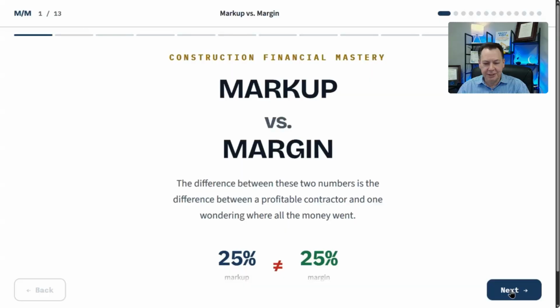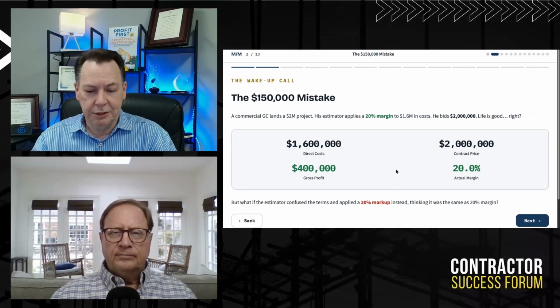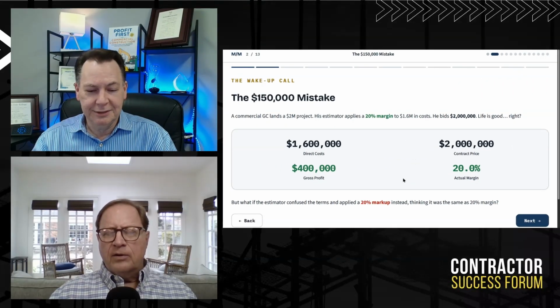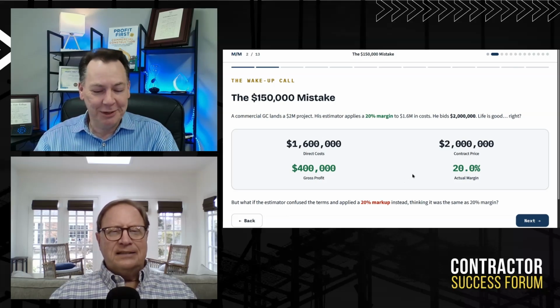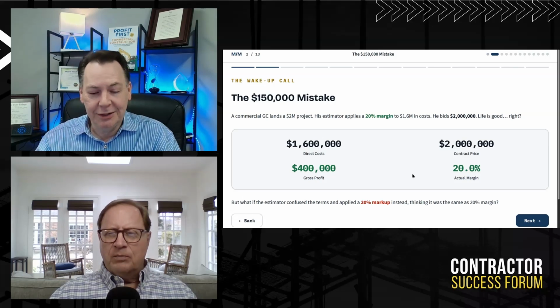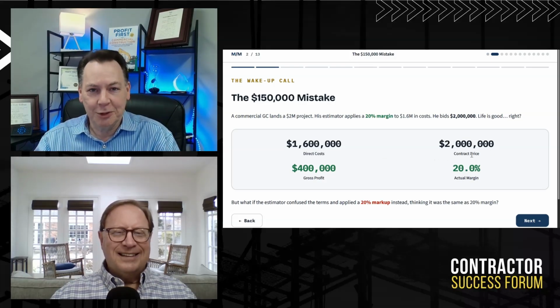Okay. So that's exactly where I wanted to go with this. So let's just say we started with $1.6 million in job costs and we wanted a $400,000 gross profit. We were looking at $2 million, right? So that's a 20% margin. You agree with the math? I don't know. I'm scaring you now, right? Sorry. Well, I mean, that is a 20% margin, right? It looks like it's more than a 20% margin. 400,000, I'll let you off the hook. This is a 20% margin.